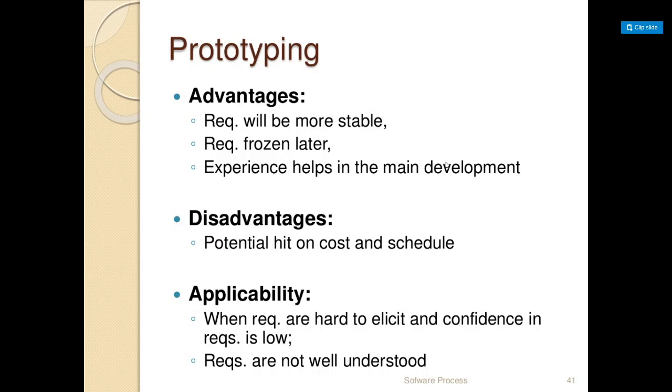Disadvantages: it's a hit on the cost and schedule. That is, more time will be required because the customer has to review it every now and then. His time is also kind of lost. And the cost, you have to develop and then see if it's working, otherwise it has to be developed again, so the cost will be a little high.